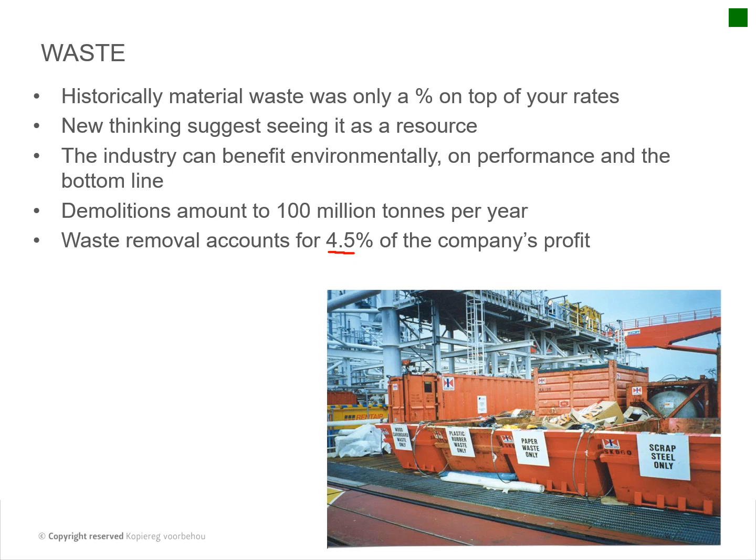So just to put it into perspective, 4.5% is quite a lot. If you're working on a million rands worth of project, that's more or less 45,000 rand, which you could have saved or put into your pocket. So yeah, it's a lot of money.